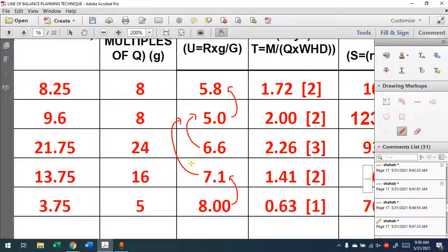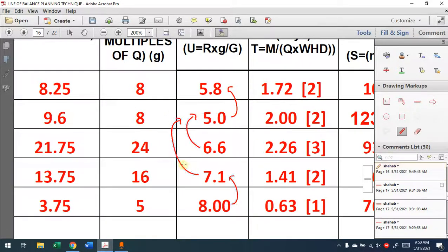Let's say in this case we have it. The relations are basically like this. They are depending in this manner. So if I draw the first one, 5.8 natural rate. The second one is 5, smaller than the first one. I will start from the bottom, which you saw. I start from the bottom with buffer 2, and at the top I have more than that.